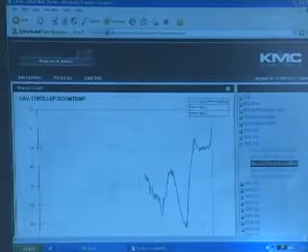So we've actually designed the project and we've submitted on it. Most oftentimes what's going to happen is the mechanical engineer will approve or modify our submittals to make sure that the project is going to be installed the way it was specified. Then we'll actually dive into the installation.